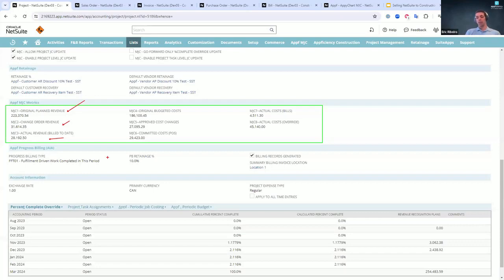It's labor, it's equipment, it's materials, it's subcontractors, right? You could have overhead, these miscellaneous charges that ultimately compute and aggregate to give you what we call your percent cost incurred, right? And you're charging for that percent cost incurred on an incremental basis, usually on a monthly basis. So this is very important, especially when you start thinking about WIP and how that impacts your WIP and being able to track that on a periodic basis.